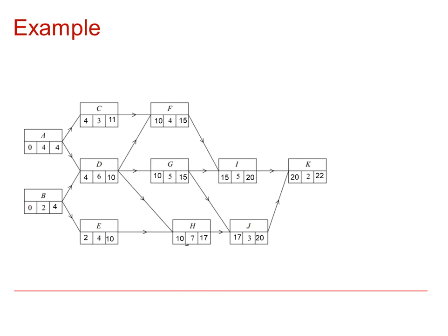So let's look at a second example. Here again, one that we did in an earlier video. The critical activities are A, certainly critical. If we go along the top, F is not, neither is C. It comes down to D. D is a critical activity. B and E aren't.